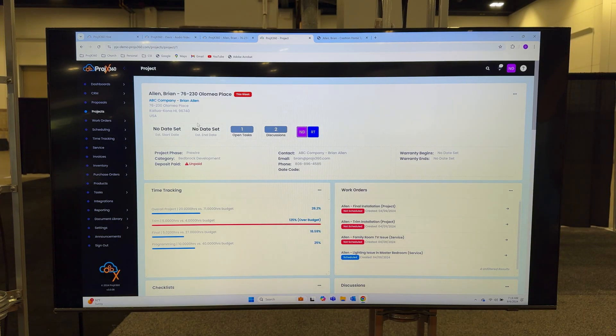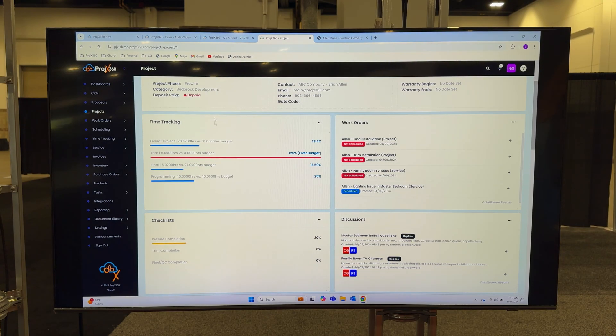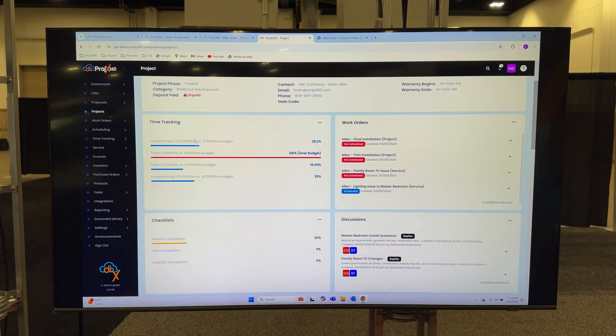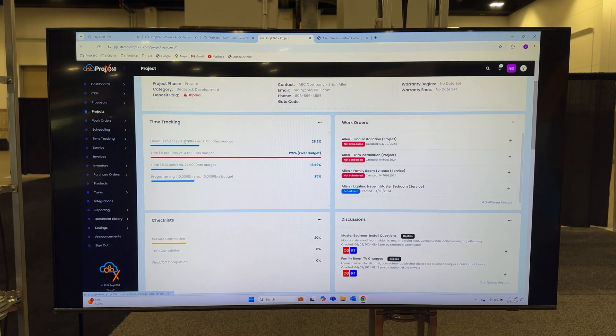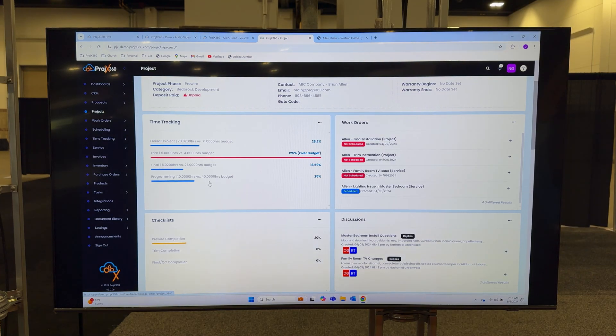It'll push all the labor phases and labor hours into our time tracking module so you can track time against what was bid versus actual. You can see all your work order history and filter them by the two types which are project work orders and service work orders.